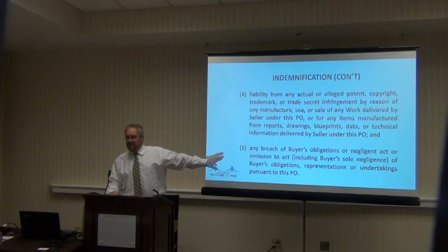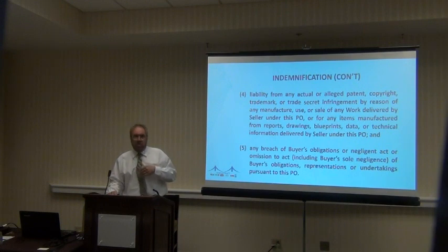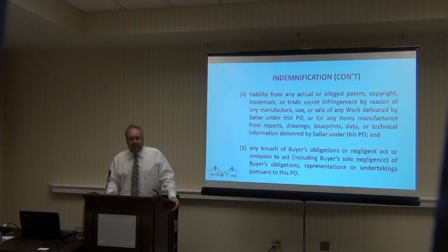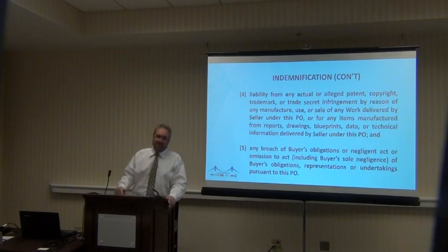5. I am seeing a little bit less of 5, the sole negligence, where the contractor is being asked to indemnify for the owner's sole negligence. I'm seeing less of that, mostly because states, whether legislatively or by case law, are starting to nix it. But you've got to watch out for it, because in states like Texas, for example, if it's permissible to do it, and you do it right, it's enforceable. And if you get into one of those, it's bad. Because I have a hard enough time controlling myself. I can never control Mr. Jim Renner.